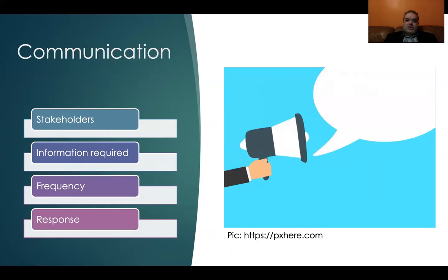Within our teams, we had a cycle of daily and weekly meetings. To our senior management, we provided weekly reports on the budget and progress. To your executive committee, we provided a monthly report on our progress, where we are with the design. For you and your managers, we provided points of contact and a weekly report.